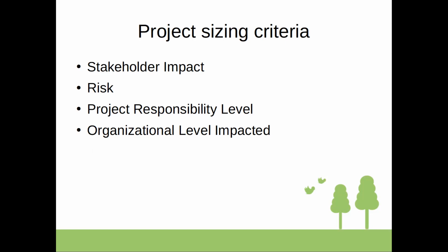Okay, this you can measure if there is some kind of average timing for the process, then you can estimate how much it would take per lead to onboard. But then how many leads will come, you don't know. You can see the statistics from previous times, if there are any, but it's also the time of the project manager and of the different leaders involved in creating the process and in maintenance activities.